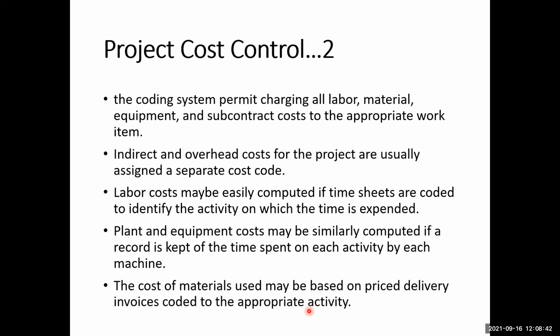So material costs are normally not measured in the project. Material costs are directly available from the invoices which we received from the supplier. So it is easier in that sense with the material cost compared with the labor cost and the equipment cost.